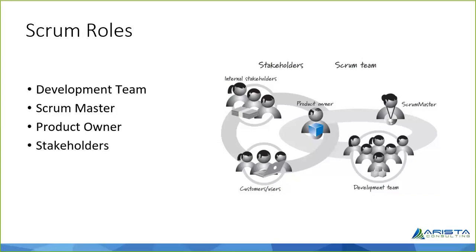The business analyst, the IT guy, the infrastructure guy, all those people are stakeholders. And one of them, mind you, only one of them. It's not a group, it's not like a PMO. No, it's only one. One person acts as a representative for this entire stakeholder community, and that is the product owner. Any requirement that comes in comes only via the product owner.